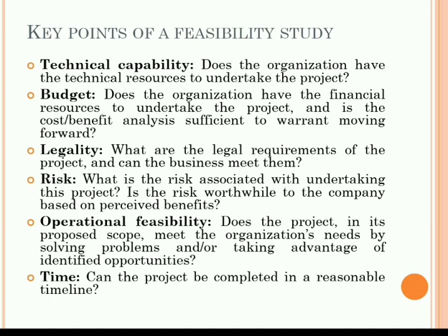Here we can say how to write a feasibility study. While writing a feasibility study, the report should include a preliminary analysis of a project, that is expected revenue, a market survey, a description of the product or service, marketing strategy, also technologies and resources that are needed, and all other things. The report should also include the organizational layout of the project, a timeline and forecast for the financial result. This is how we make a feasibility study report, by considering all the things that I have told.